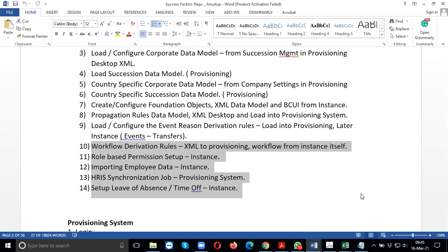But again, it will always be scenario specific, right? For Employee Central implementation, it takes around 9 to 10 months sometimes to implement the entire Employee Central in a company, if it is a full cloud implementation. Now, if it is a hybrid model wherein they are already working on ERP and only moving Employee Central to cloud, it might take less time, but generally 6 to 9 months is the bare minimum it will take.